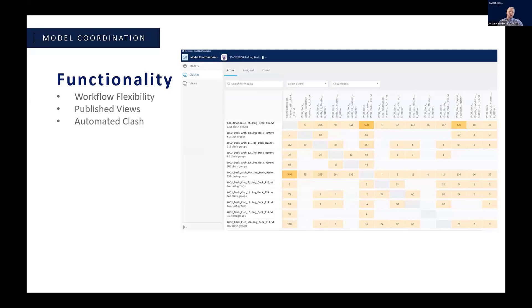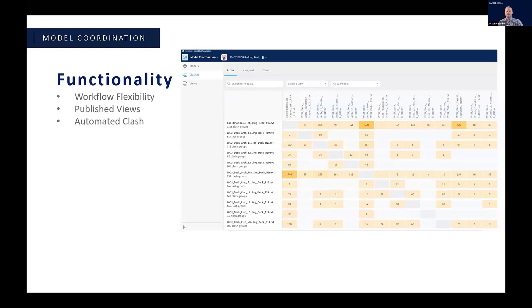You can actually set up a federated model in your coordination space to pull all the other data in. And from there, the views that you're seeing here, kind of listed down on the last slide, are all of the views that were in that publish list. So any of the 3D views that you've got set up that get published get listed or get brought into model coordination.